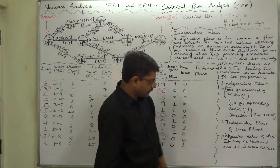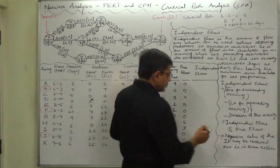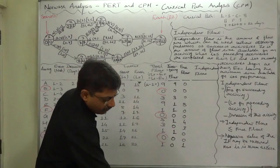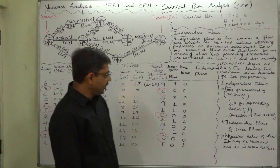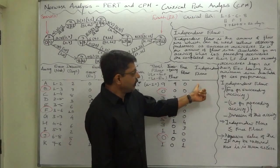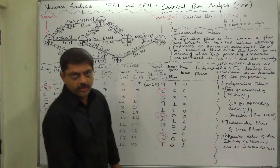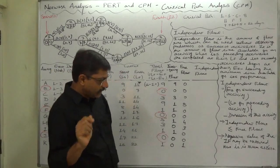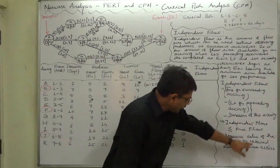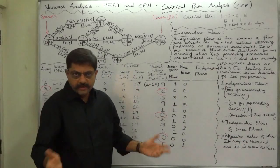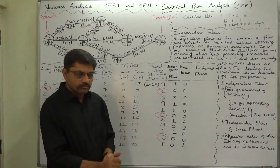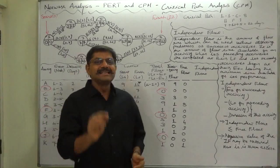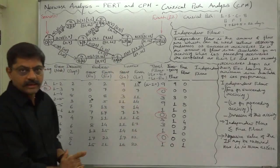Independent float is always less than or equal to free float — it can never exceed the free float. If you calculate independent float and it comes to an amount greater than free float, then it is an error and we have to check. A negative value of independent float may be obtained mathematically, but it is taken as 0.